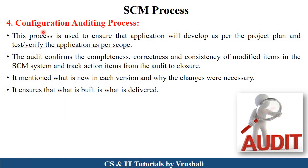The next step is the configuration audit process. Basically, the configuration manager identifies whether all the changes are properly developed or not. They audit the completeness, correctness, and consistency of modified or changeable items in the software configuration process. They also mention what is new in each version and why the changes are necessary, then audit and verify the complete process and maintain a document accordingly.